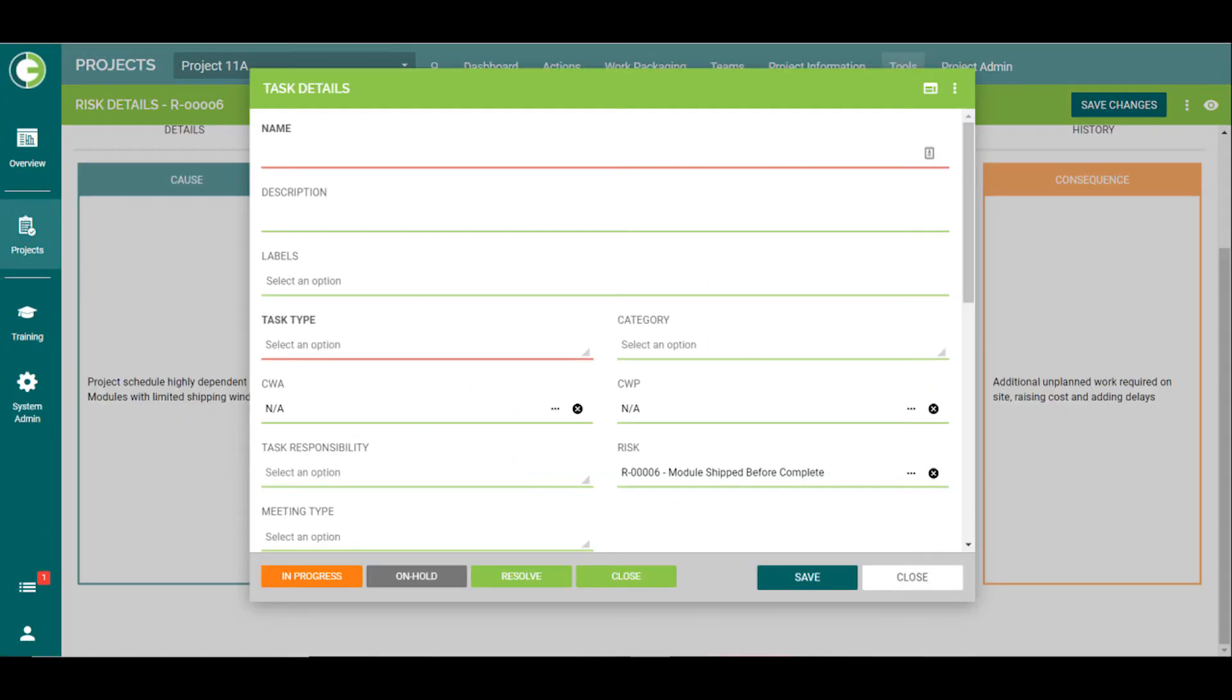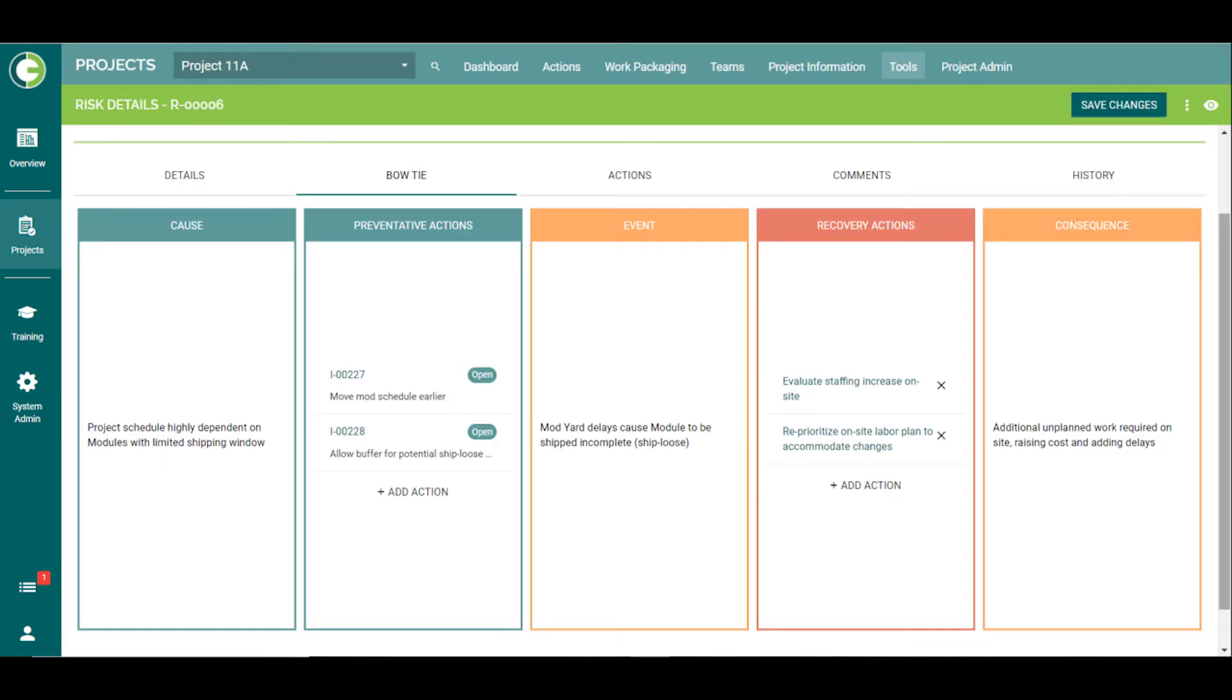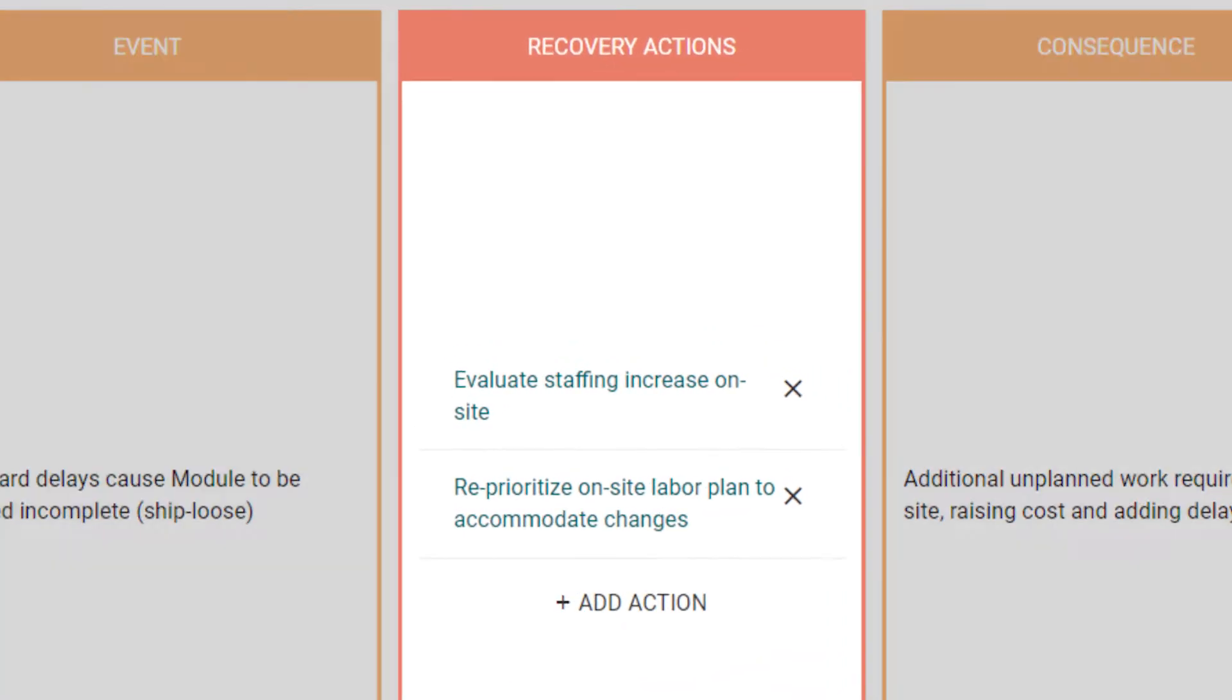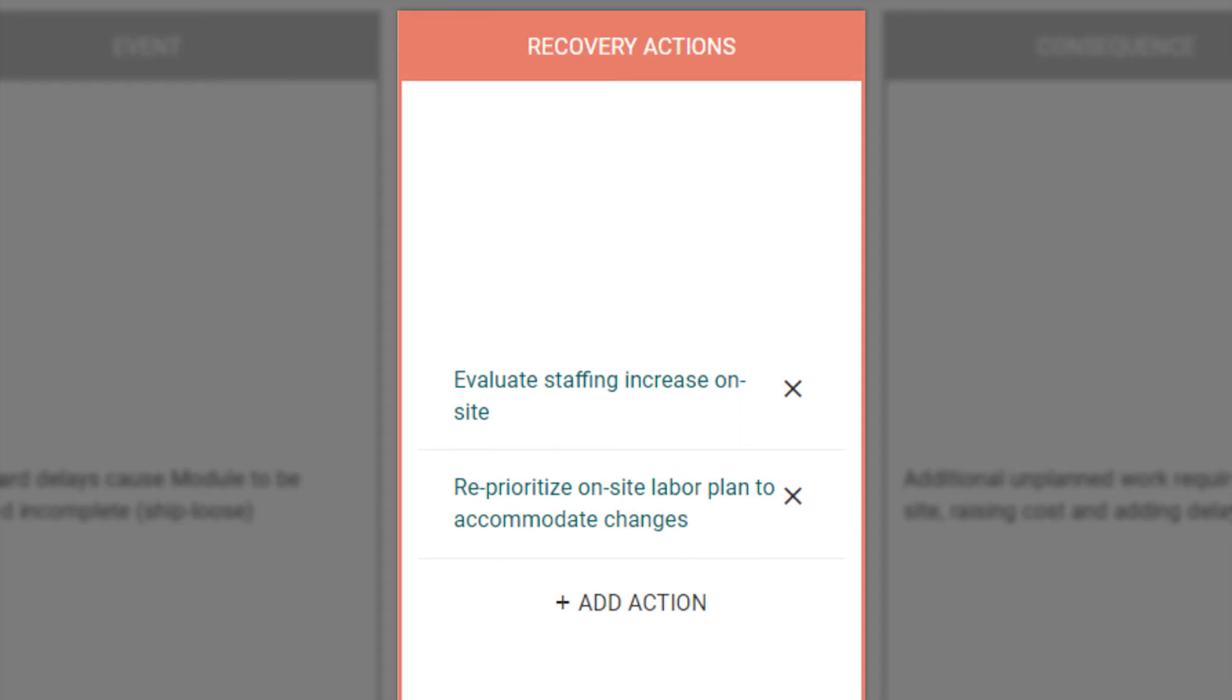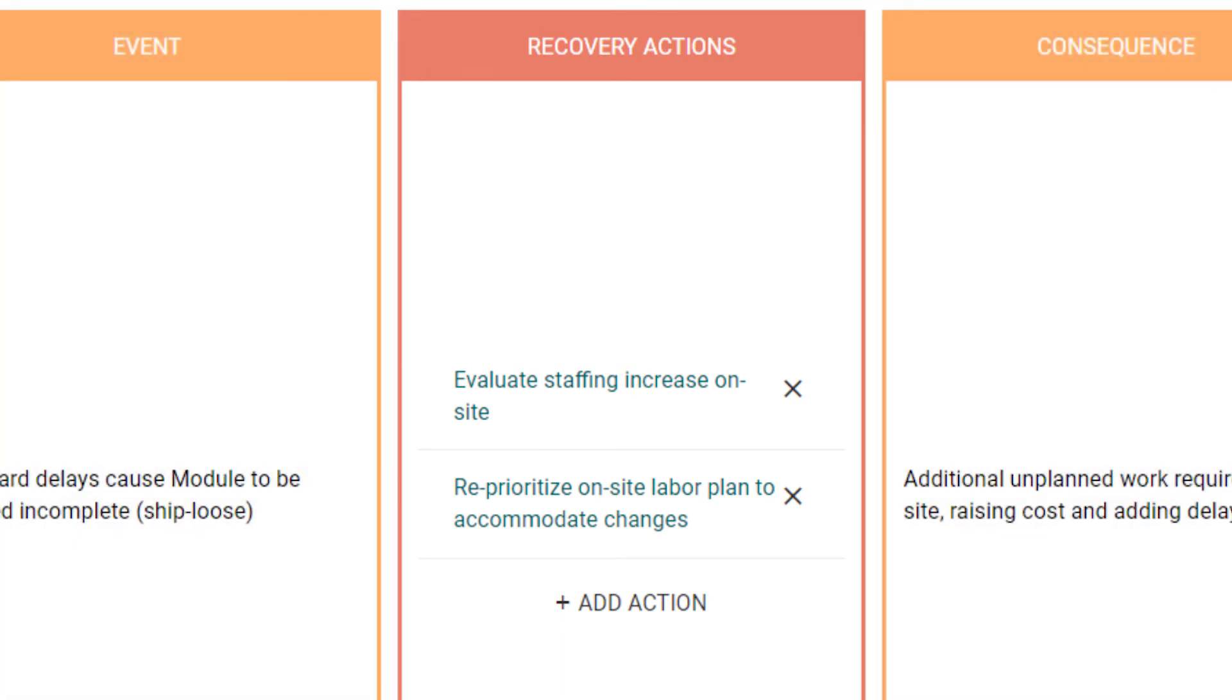The benefit of adding them here is that it will kick off other trackable actions within O3. Also, if a task is created as a recovery action, the task will not come into effect unless the status of the risk is changed to activated or addressing.